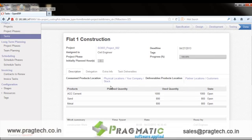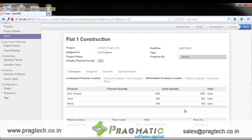There may be scenarios where the user will have to consume some products while executing a task, so the user can list out all the products with their planned quantities. The used quantity can be updated at the time of actual work done. To consume stock, the user can define a specific location, as in the construction industry there are often multiple warehouses or site warehouses for different projects.